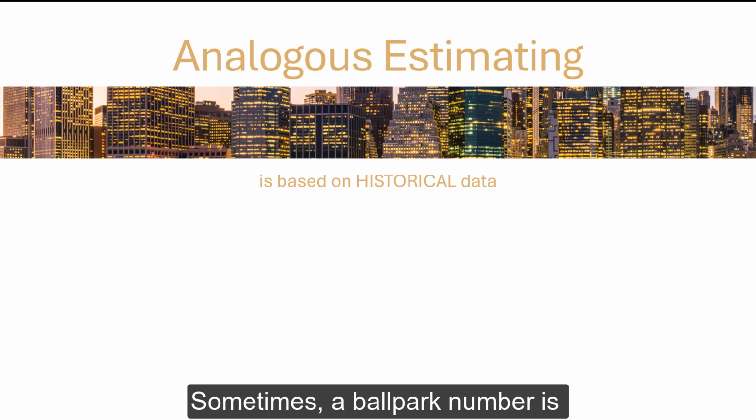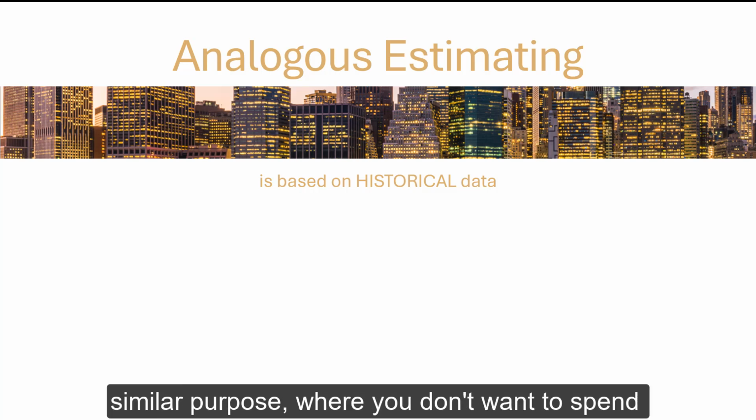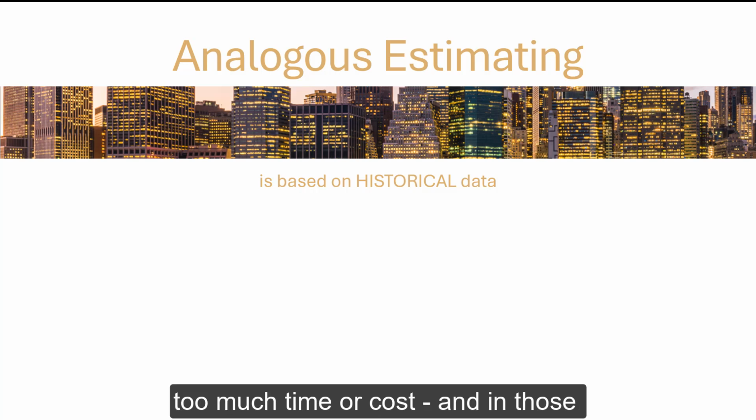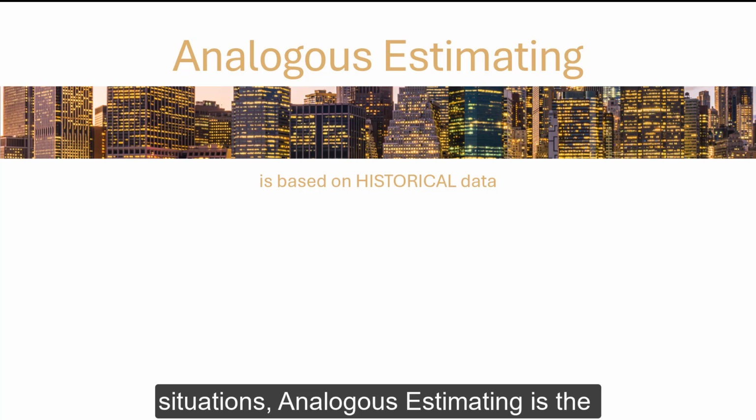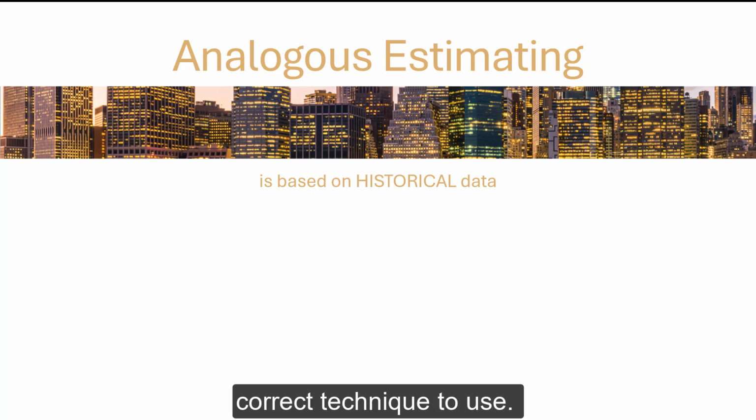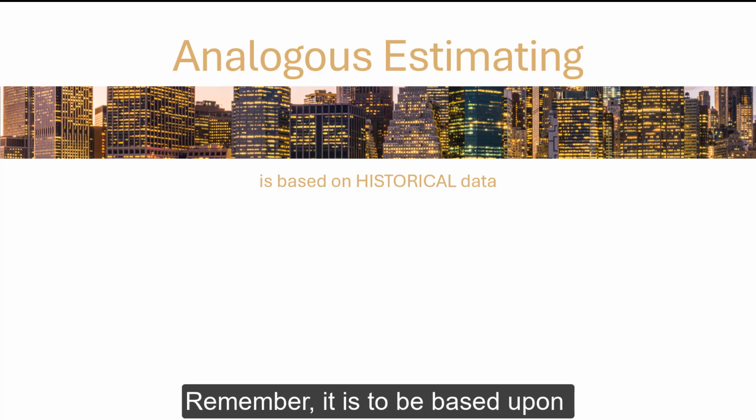Sometimes a ballpark number is required for feasibility analysis or some similar purpose where you don't want to spend too much time or cost, and in those situations, analogous estimating is the correct technique to use. Remember, it is to be used upon historical data.